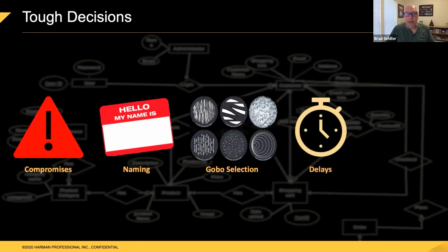Plus, there's always delays along the way. You might have problems with your vendors. They might not be able to deliver on time. Tooling might take longer than you expected, or you might not be able to afford new tooling, so you have to only go with one set of prototype lenses before you go into actually making your full ones. There could be problems, as I've described.